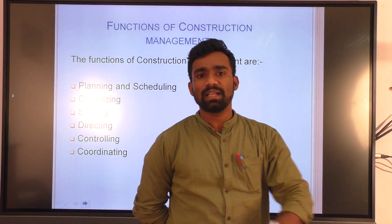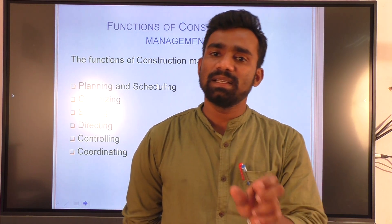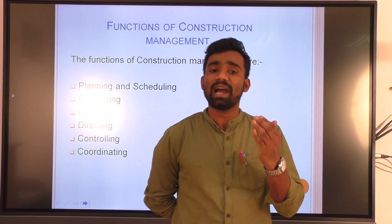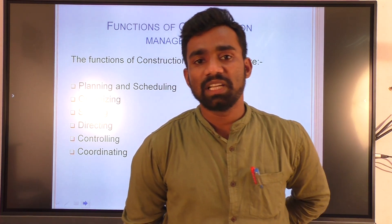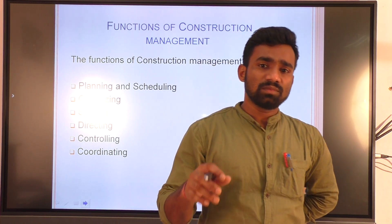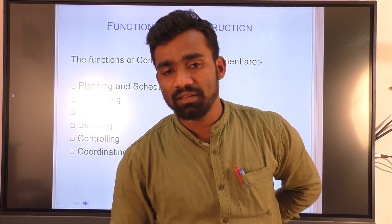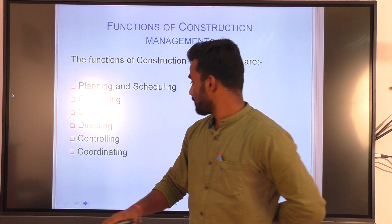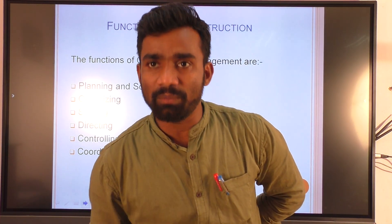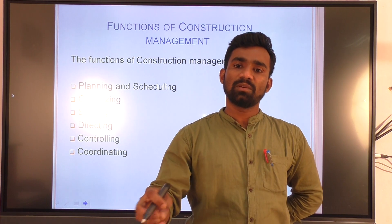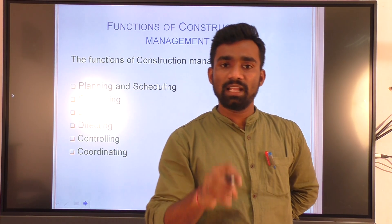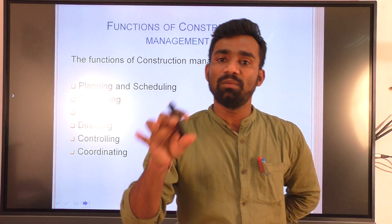If something is not going as per your plan — suppose you planned to excavate, do PCC, or brickwork in a number of days but the work is not on track — then you should control. Control means you may take some overtime periods so the work is completed on time. Next is coordinating with all your team members — the people may be laborers, engineers, or architects — your main aim is to coordinate at all levels.